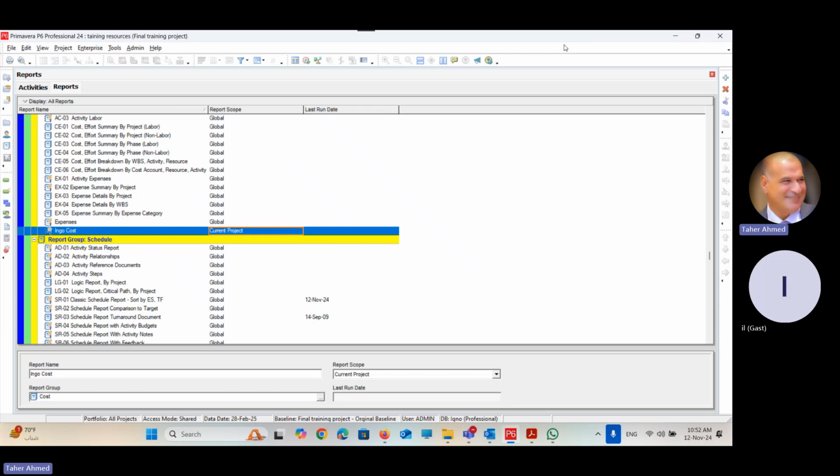We finally knew about how to create a project website for your project. Just go open there, choose tools and publish, then choose the topic you want to create the website about, choose the graphics or the layouts you want to show at your website, choose the report you want to view at the website. It will include all information about the documents you are assigned and activities and work breakdown structure as well. Is it clear? Yep. Okay.